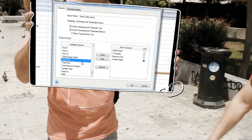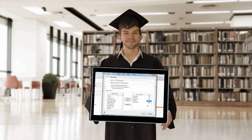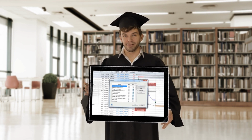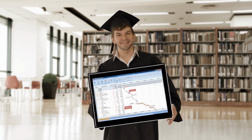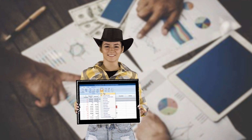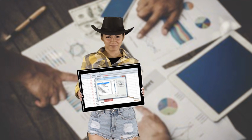They can also be used to pinpoint over allocation problems, where a team member is allocated to more than one task. Obviously, they can't work on two things at once, so if not picked up, these problems will affect the project plan as it slips behind schedule. Use the resource report to ensure there aren't any clashes for individuals and reschedule those tasks as necessary.